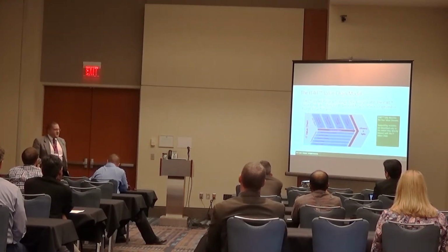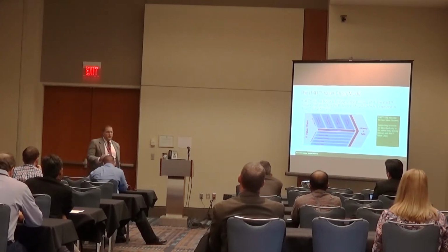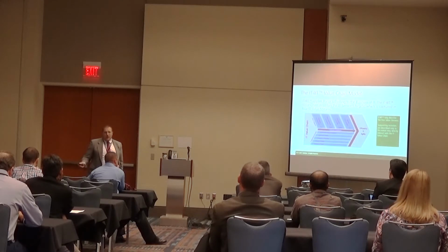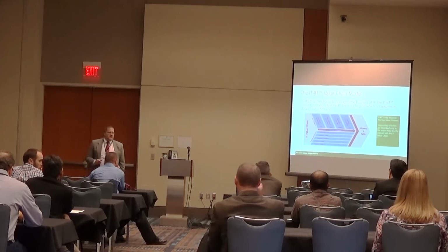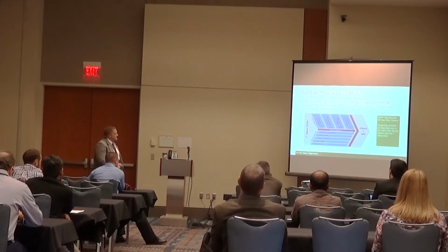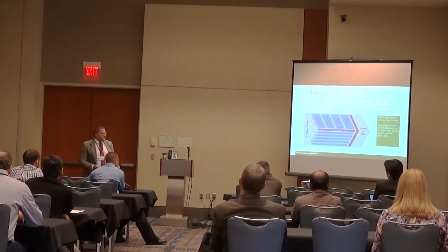So that was the intervention that we made with them, was to say, yes, you can keep this project going if you want, but if you don't do an intervention over here in the strategy and portfolio space, you're actually not going to benefit the organization at all. So we actually helped them queue up a new piece of work to drive some thinking into strategy portfolio so that they would get the benefit out of the other work that they were going to try and do. So that's a really nice way to use this value chain holistically, looking across the IT function.